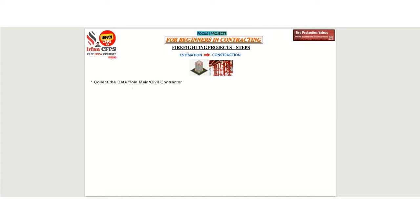The first step: as a fire contractor, we need to approach the main contractor and collect the required data, such as firefighting design drawings, bill of quantities, and technical specifications.